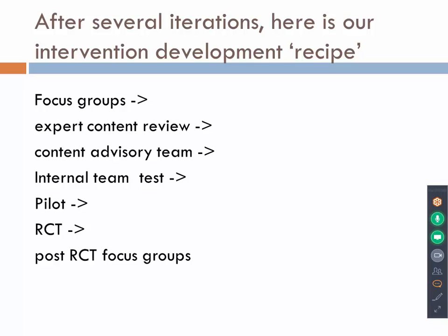And then pilot it. Don't not pilot it, because if you don't pilot it, the first participants in your RCT are going to be an unintentional pilot, I can guarantee. Technology breaks. It breaks all the time for reasons that you just can't explain, right? Nobody knows why. Something that worked in a last intervention, we haven't changed a thing in the programming, no longer works. We don't know why and we can't fix it.